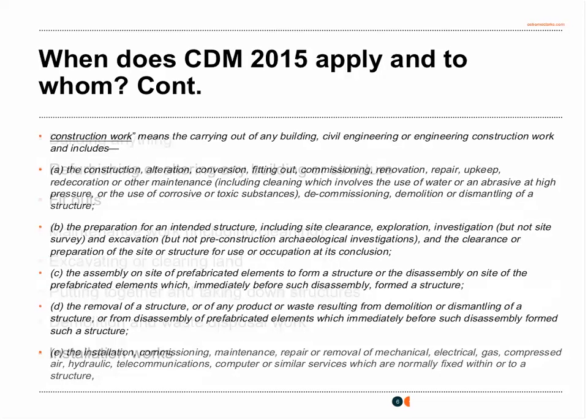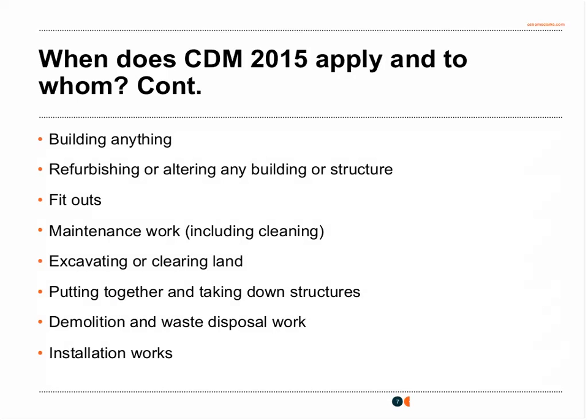If you turn to the next slide, you will see that essentially what that definition says is that if you are building anything, refurbishing or altering any building or structure, carrying out fit-out work, maintenance, which includes cleaning, excavation or site clearance, putting together or taking down structures, demolition or waste disposal, or any form of installation work, then you are likely to be counted as undertaking construction.